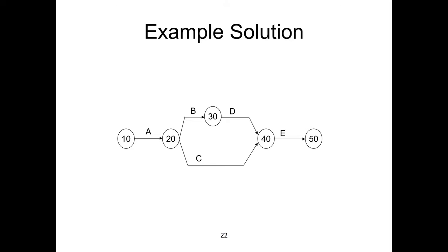We put numbers with gaps so that if we have to go into scheduling on a computer in more detail, we can put in more activities. Like we have the foundation, so we can break the foundation into fixing of formwork, fixing of reinforcement, and casting of concrete. Even just fixing of reinforcement, we can split more, like cutting and bending of the rebars, then transporting and fixing that on site.